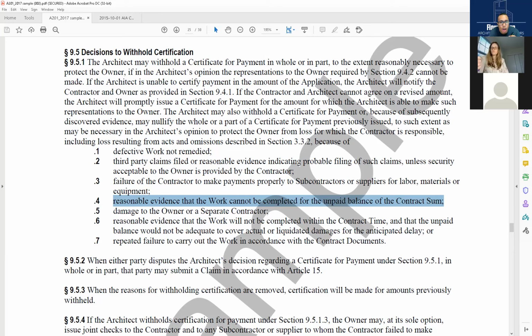Never. And there's only $150,000 left on the job. And the subs are filing claims left and right for like $300,000. You're like, wait a minute. We're in trouble here. Houston, we got problems. So that's when you stop immediately and try to figure out how we are going to complete this job. It's a complicated procedure, but we got to involve the insurance company. We got to figure out what the issue with the claims are and all that stuff. And it has to get resolved. But that's a good spot to stop right there. You don't keep just paying because then you're going to have a lot less money to deal with the problem.